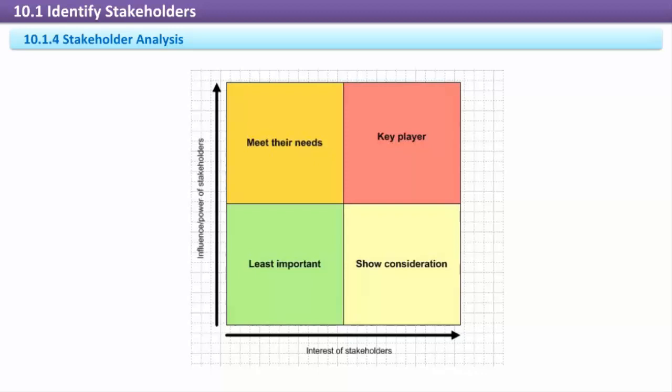Stakeholder analysis helps us determine on whom our time and effort is best spent. To perform stakeholder analysis, we'll need to: 1. Make sure we identified every person, group, or entity affected by the project. 2. Assess each stakeholder's interests in the project. 3. Know the influence each stakeholder holds. 4. Develop proactive strategies for dealing with stakeholders.